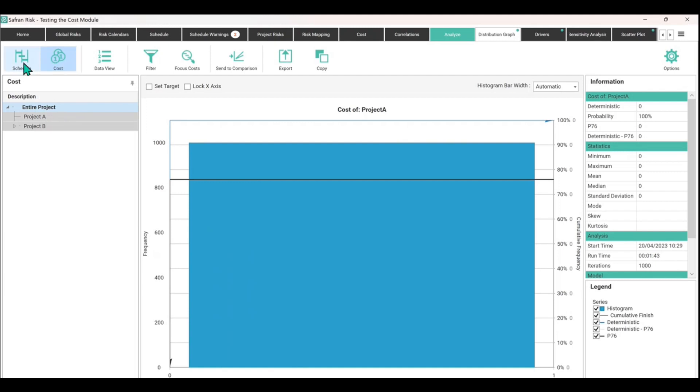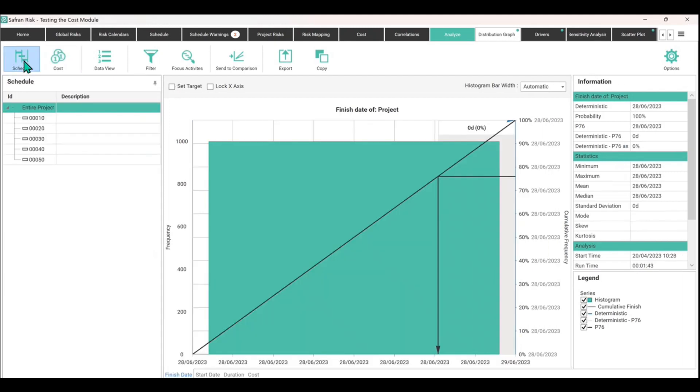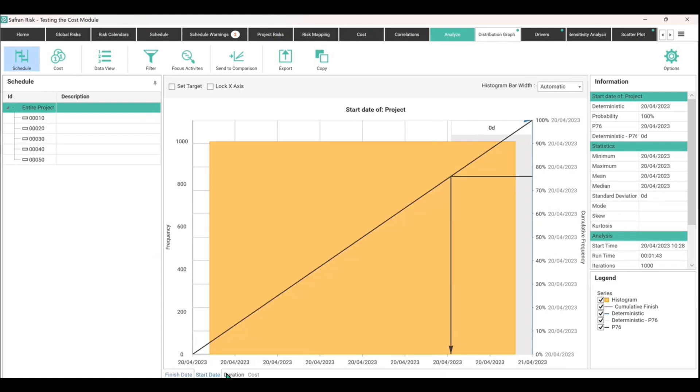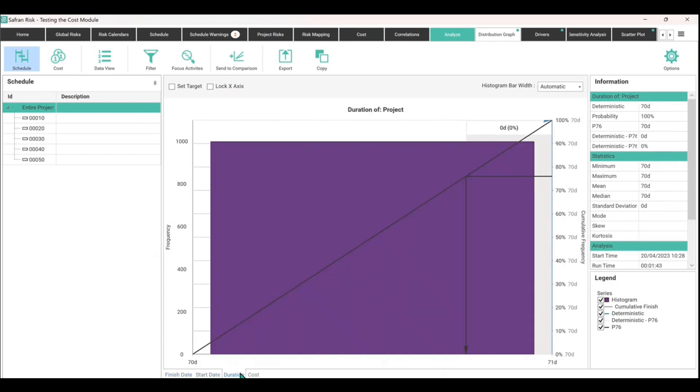Really important distinction between these two things is if we click on the schedule just briefly, you'll see those were the five activities we added. There is no uncertainty, so it's just a singular output, single answer. You get the same date shown on that axis at the moment, start date, the duration, and the cost shown at the bottom.